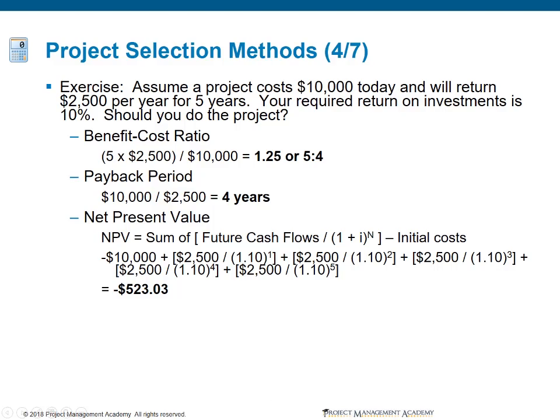While in some situations, we may have projects that do not generate revenue. If we think about something like maybe some type of ecological site remediation or some type of social welfare project, or perhaps some type of advertising campaign, we're not realizing immediate monetary benefit. However, if we're doing that type of a project, it's very unlikely that we would use this model to make a determination as to which project to select. If we see a negative net present value, that indicates that we were interested in the money a project could make, and we realize that we're actually going to lose money. That's not going to be a good thing, and we do not want to select that project.